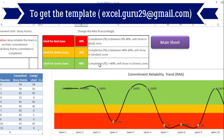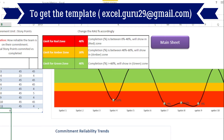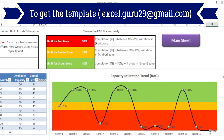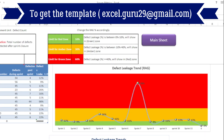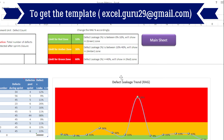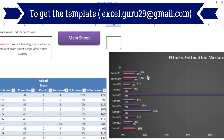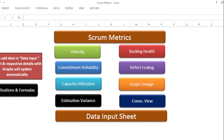In the same manner, you will find the calculations in the other sheets as well. This is the commitment reliability sheet, and the calculation is being shown here too — all details are populated automatically from the data input sheet. Once you are done, you just need to copy or drag the formula down to capture other sprint data. Next is capacity utilization, then effort estimation variance, then defect leakage — all graphs are shown in RAG format, and you can change the percentage for your red, amber, green zones as per your need. Next is scope change, where data is also fetched from the main data input sheet. This is how you can manage and maintain your scrum metrics using this dynamic and automated template.